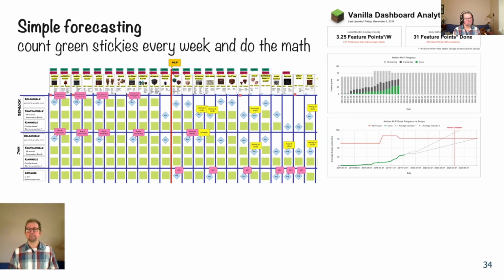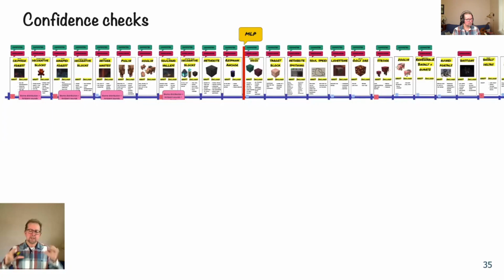So a bit of data, but subjective data is also really important. So sometimes, maybe once per month or so, we do a quick survey and ask people, how does it feel? What is your gut feeling? Looking at our current set of committed features, right? And committed feature, by the way, means the minimum level of product is by definition already committed. But as we get those done, we will commit to more and more features. And committing basically means saying that, you know what? I think this is going to get in. Let's assume this is going to get in, right?